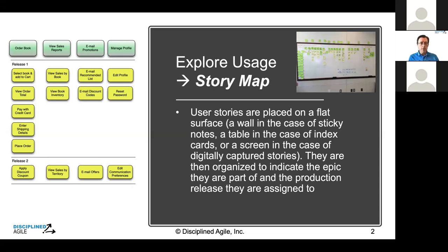Well, a number of years ago, I don't know, it'd be like 5 or 8 years ago, time flies, Jeff Patton came out with a book on story mapping. And it's basically the same idea, but it looks like this. You've got the epics or features at the top, and same idea, just like a use case. Like you could argue that those epics are actually use cases. And then you flush out, go down, write sticky notes for each of the stories. And it's a good way to organize your thoughts, flush out the functionality, and organize it.